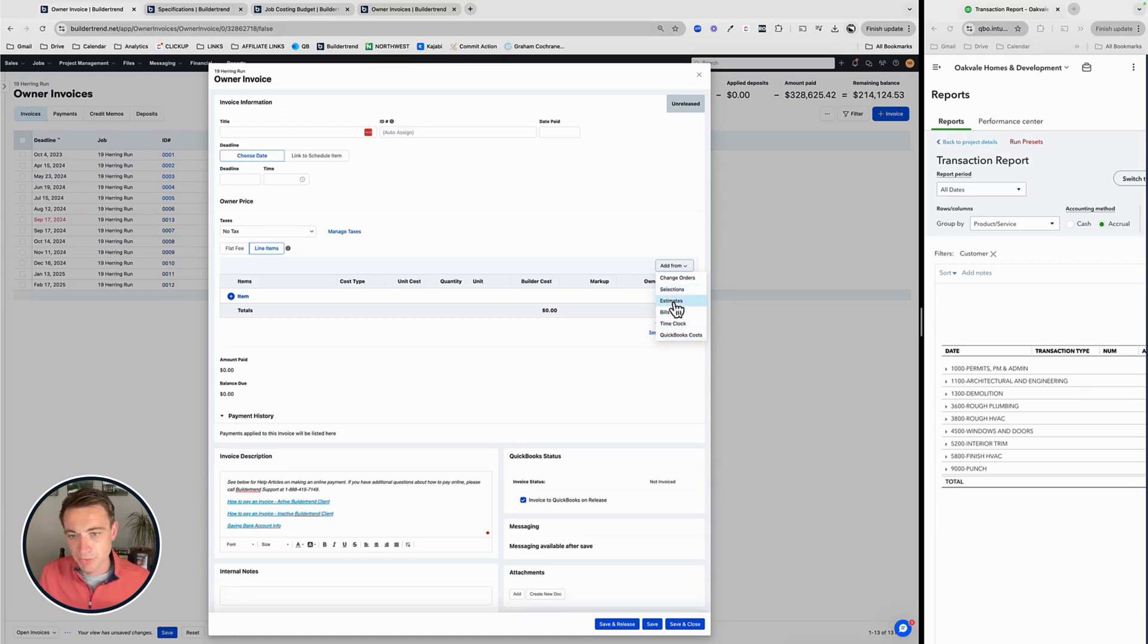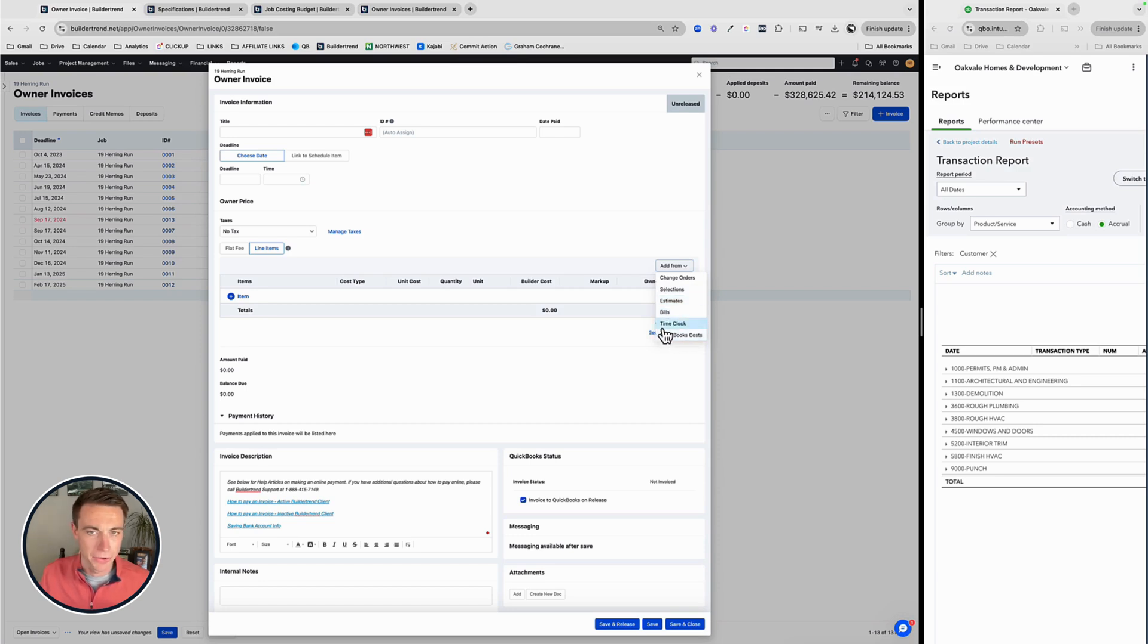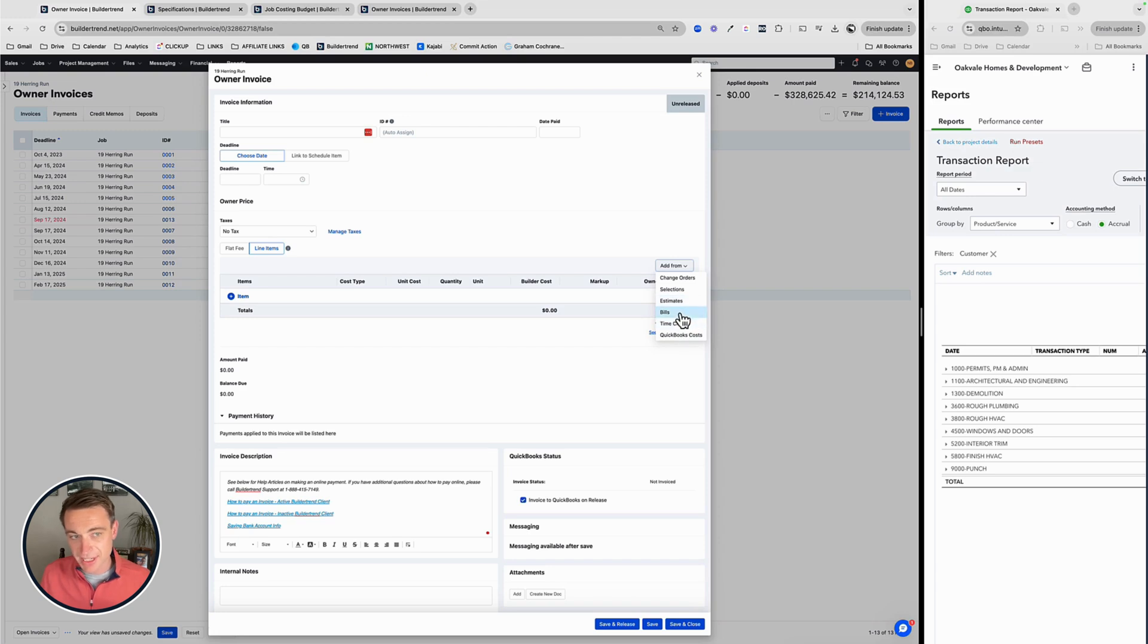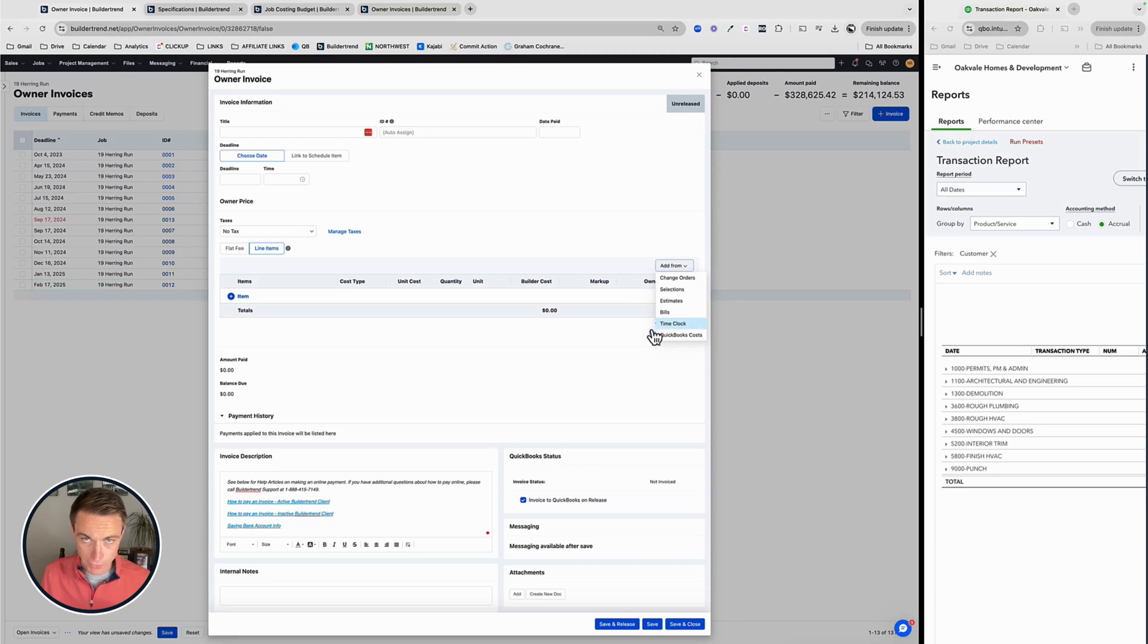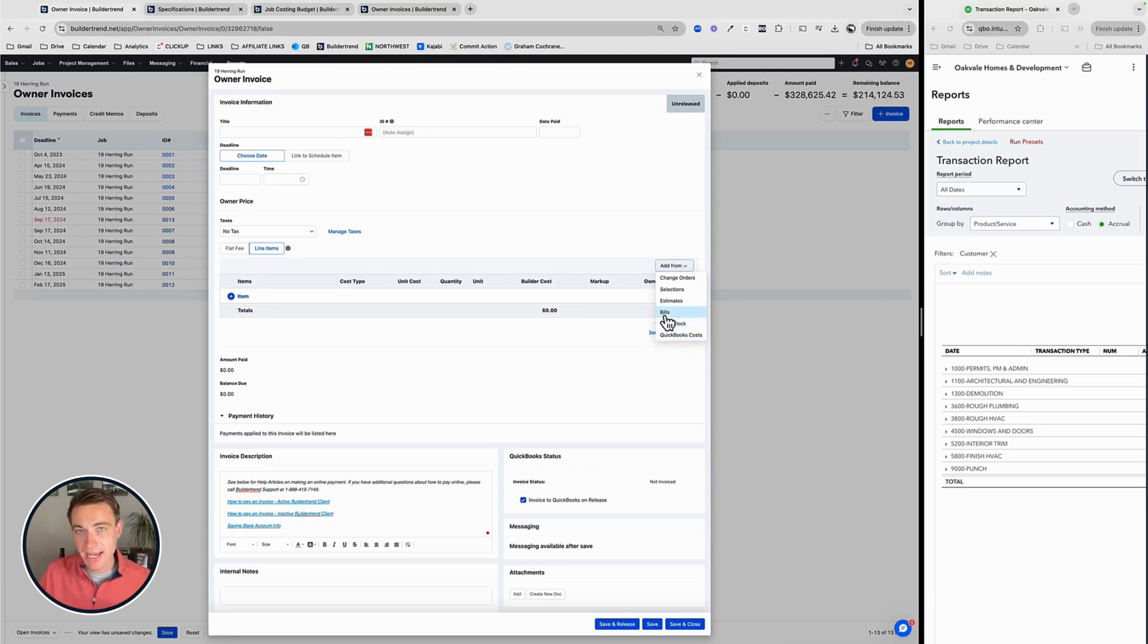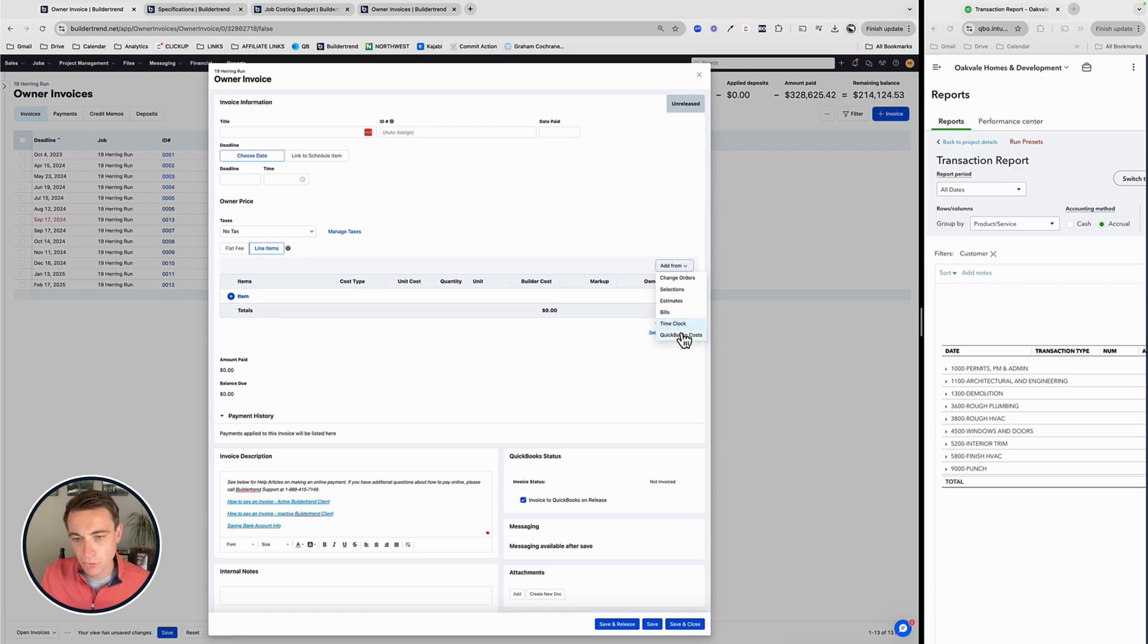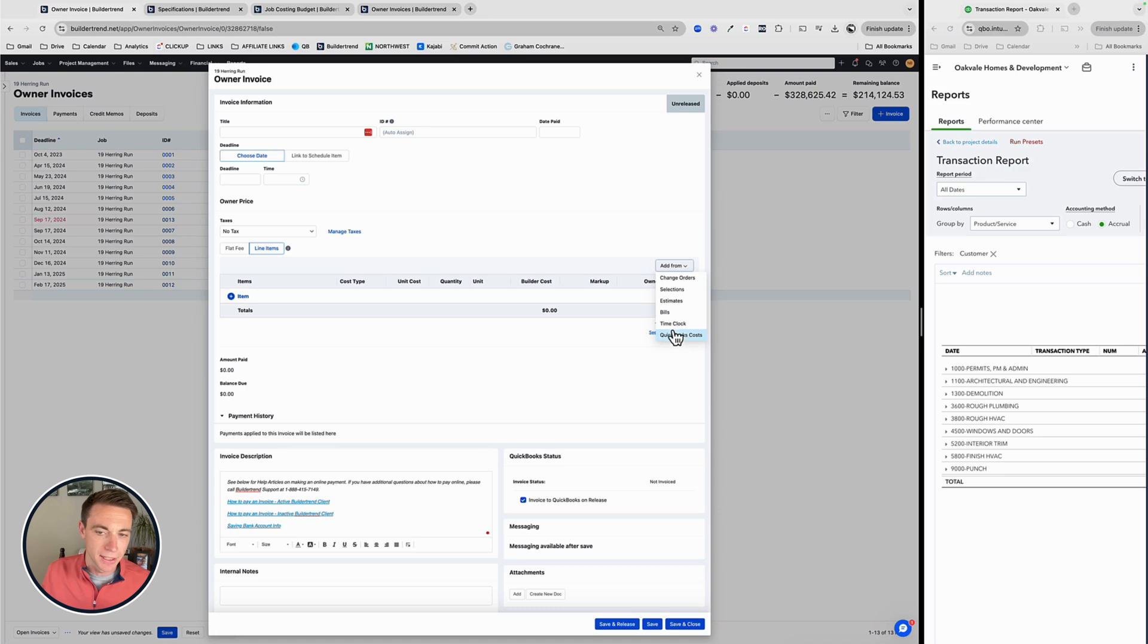When I do a selection, when I do an estimate, I'm typically not going to bill that to a customer until I actually incur the cost. That's how I set up my contract. It's up to you on how that works, but these will show up here. Now, what I like about what BuilderTrend has done here is they're only going to give you these options if these expenses exist. So if I don't have any time clock here, this won't show up. Same thing with QuickBooks costs, same thing with bills. And as I indicate some of these, they're going to be removed from the list on future invoices. So we can't really double count them, which is good. And this has gotten stronger. The newest point of this whole thing is the time clock and the QuickBooks costs. This is new within the year.